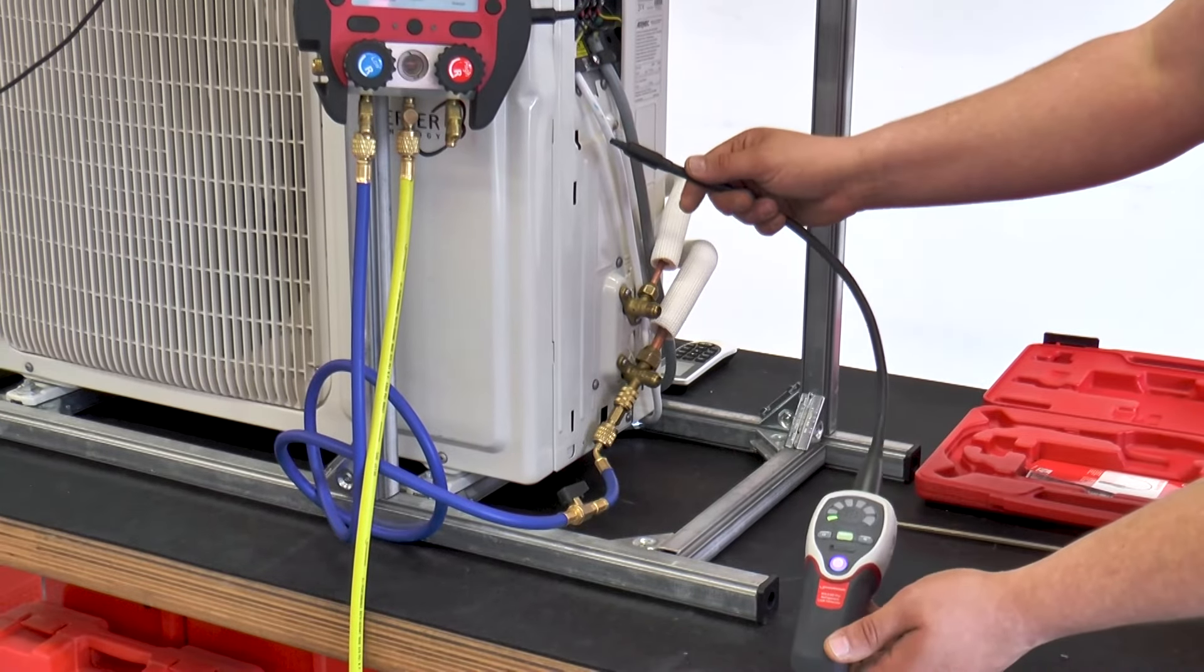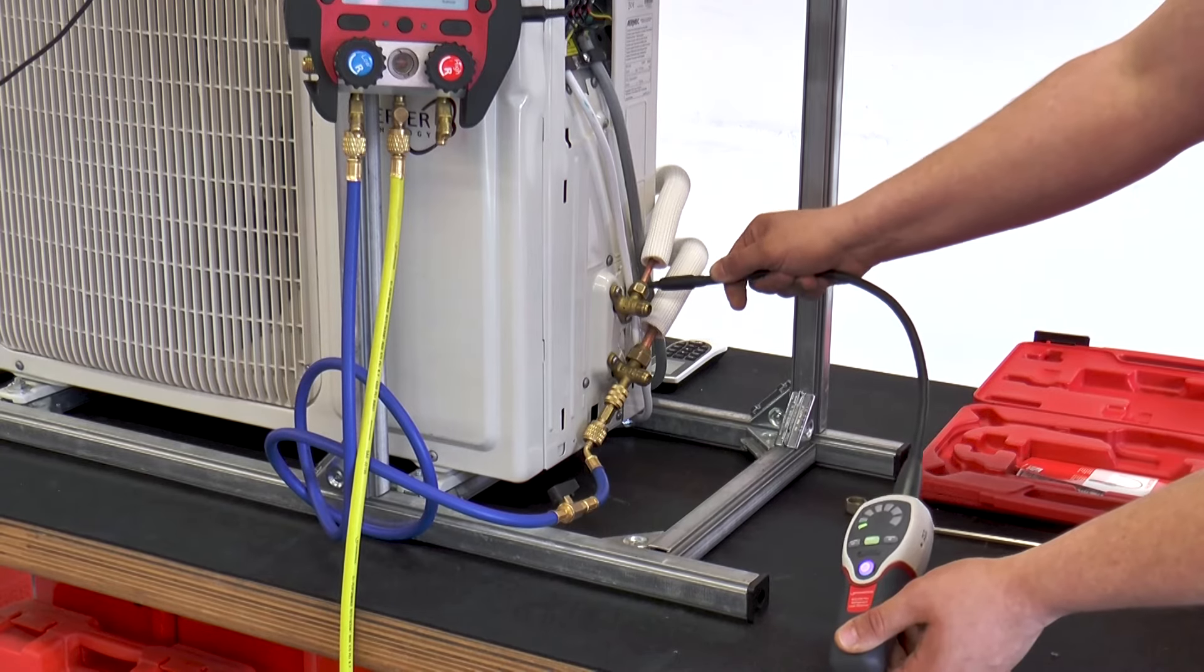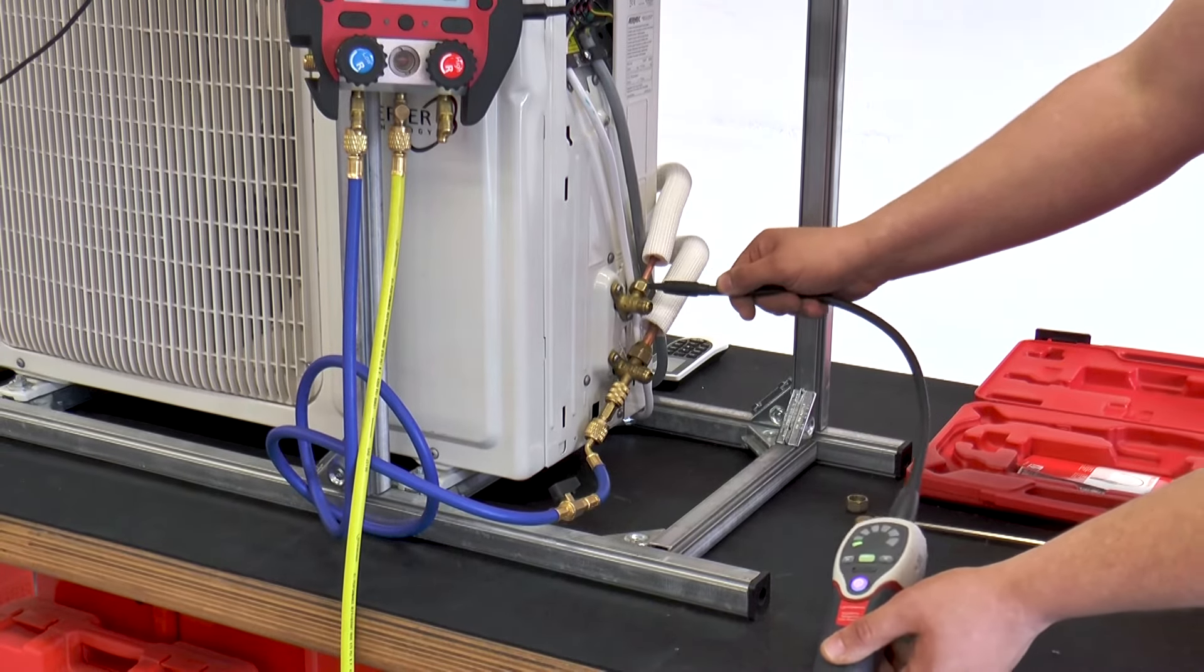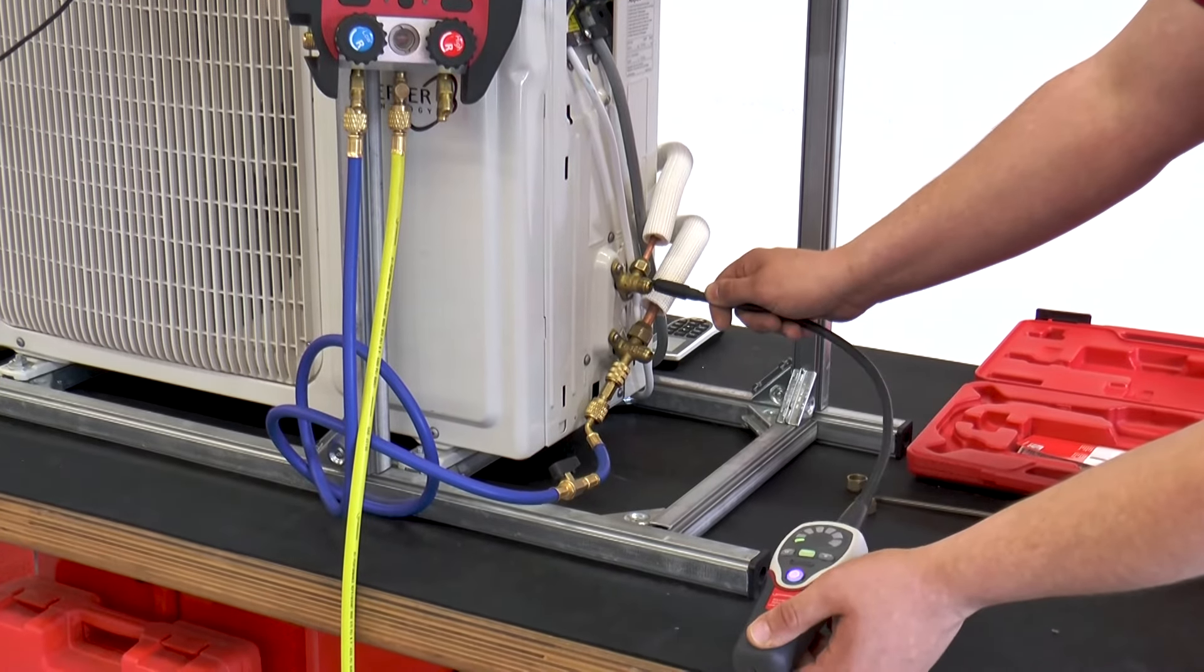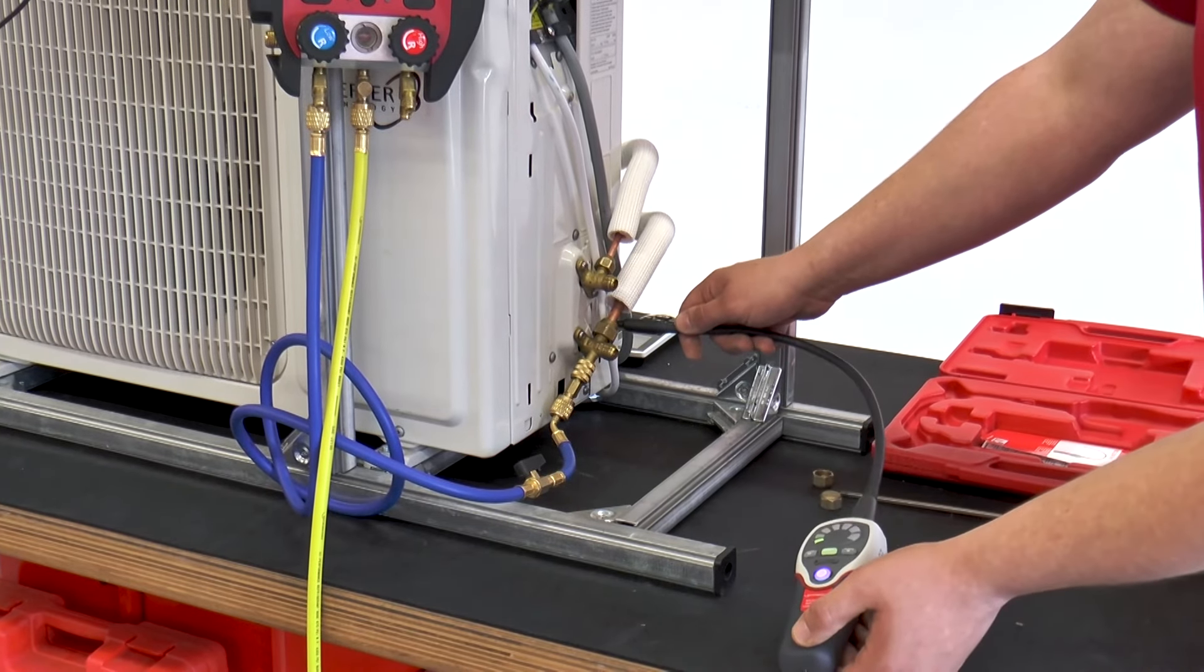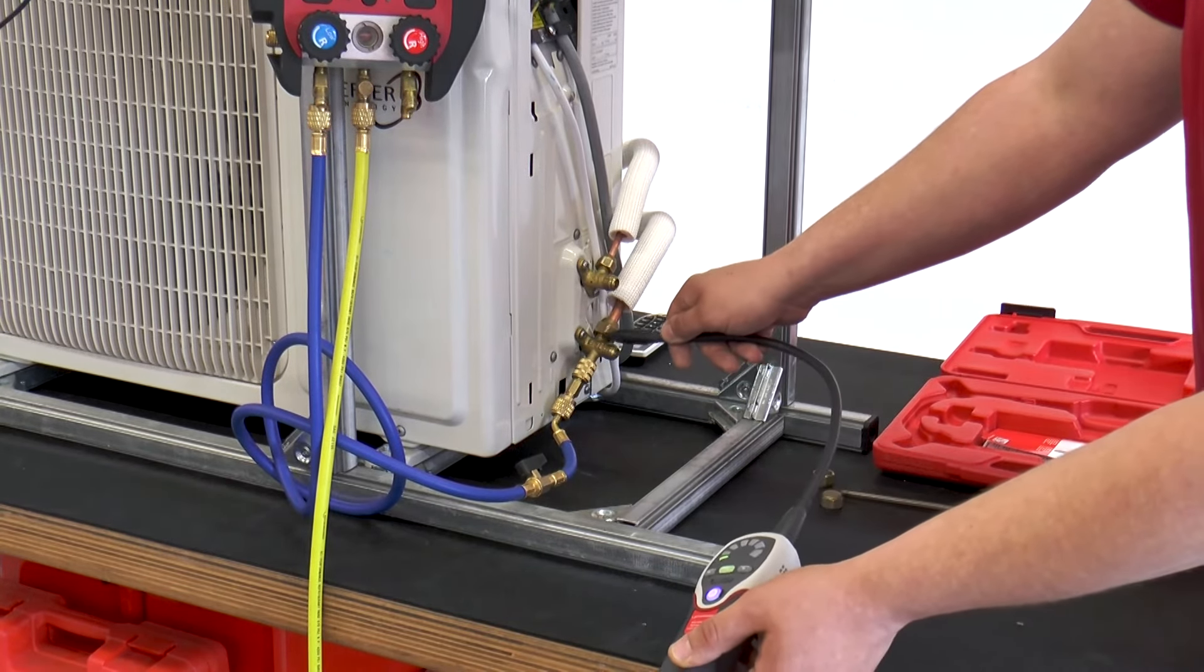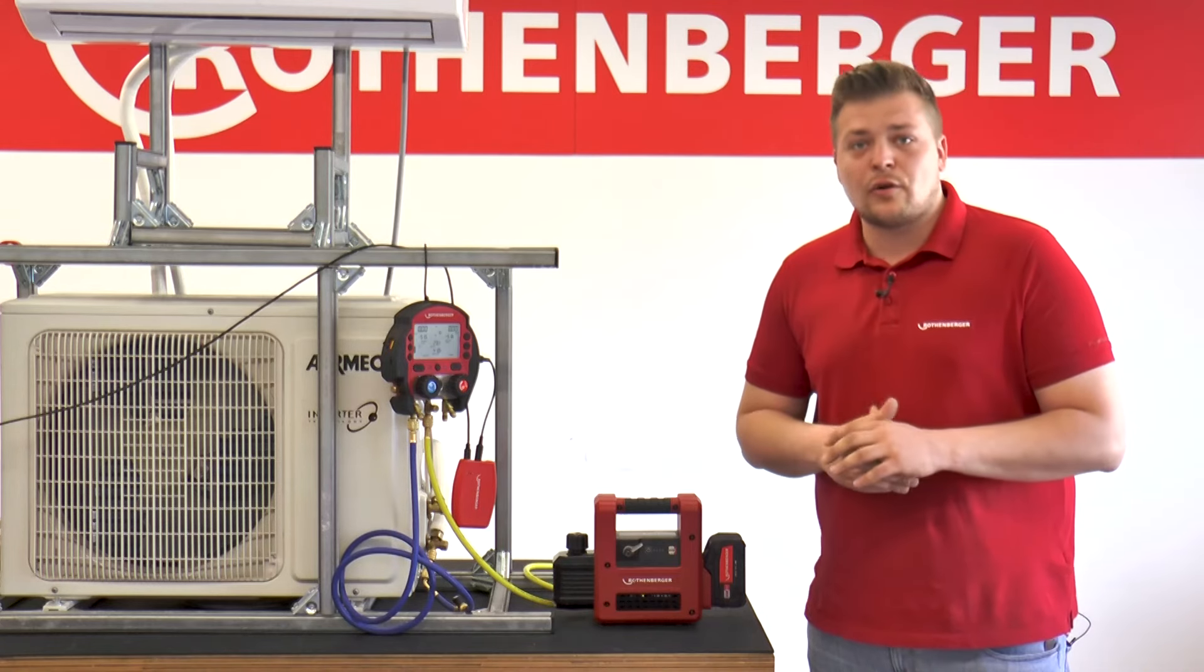Before the air conditioning system is switched on, it must also be inspected with an electronic leak detector. During this inspection, all connections and components are inspected. If a leak is detected, the refrigerant must be removed from the circuit, the leak must be repaired, and all previous steps must be carried out again.